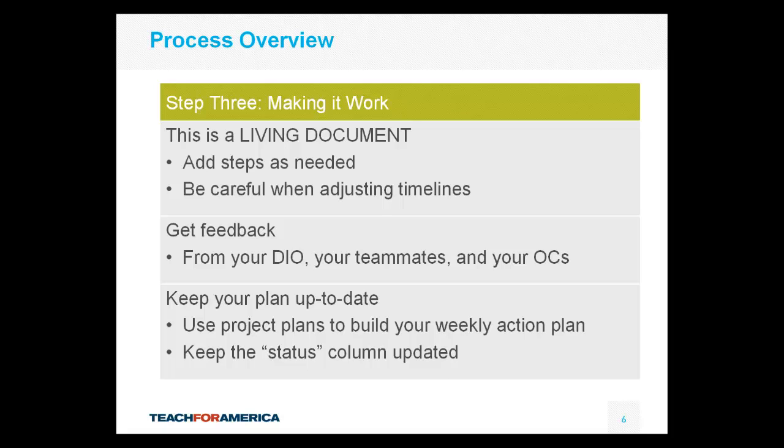At the end of the week, as you start planning for the upcoming week, open up all of your project plans and go through the upcoming due dates one by one. Make sure any actions have either been completed or are on your action plan for the coming week to be completed at a specific time. Next, look at any upcoming start dates and make sure you are including time to work on any longer-term projects so the due dates don't creep up on you.